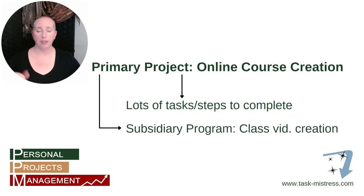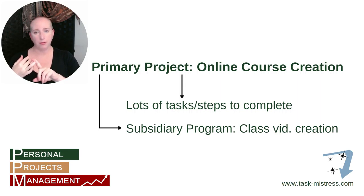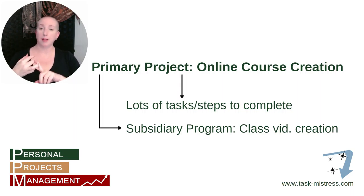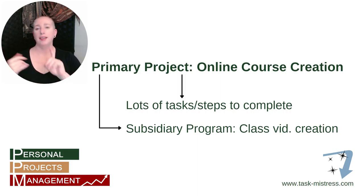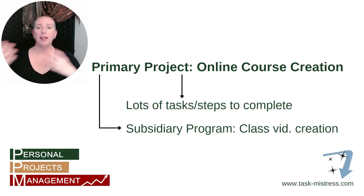As you go through each video, you follow the steps listed on that subsidiary program worksheet — things like: outline it, write the script, practice and edit it, set it up in a teleprompter, then actually film the video (which will probably take several takes — even this video took me two takes). Then you edit it or outsource it to be edited, and finally integrate it into the class module it belongs to.